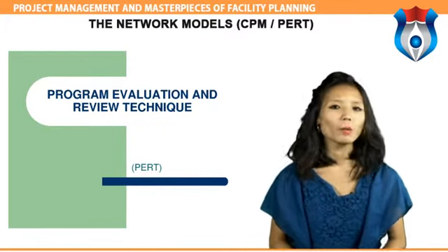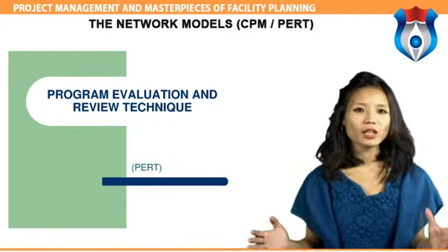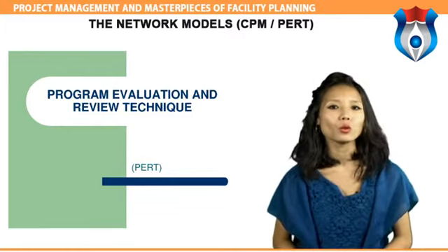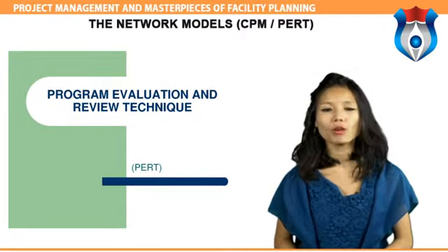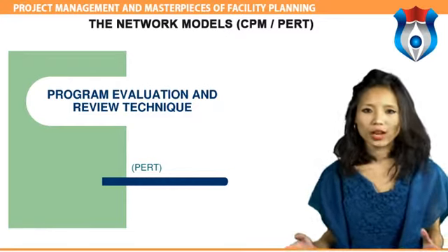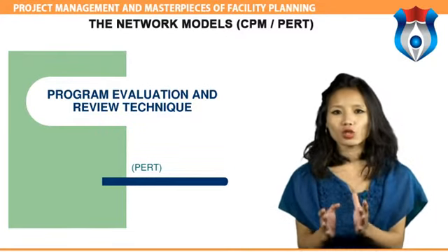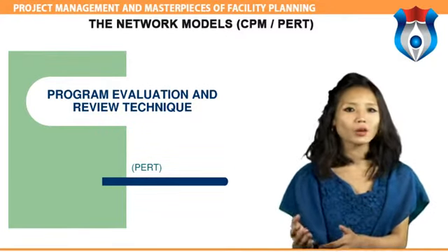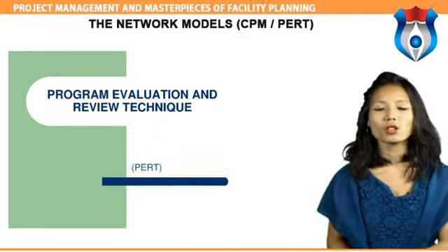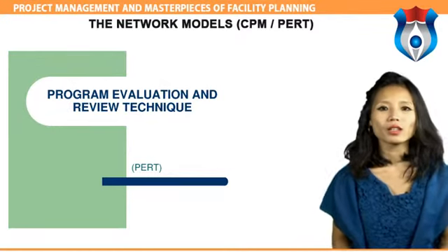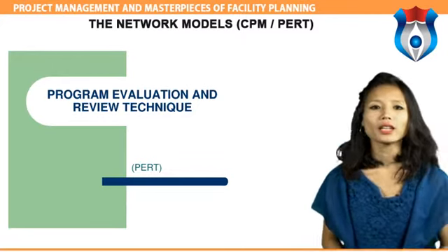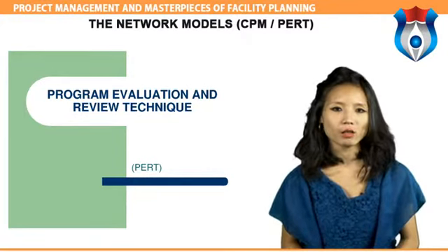So far we have talked about projects where there is high certainty about the outcomes of activities. In other words, the cause-effect logic is well known. This is particularly the case in engineering projects. However, in research and development projects or in social projects, which are defined as process projects, where learning is an important outcome, the cause-effect relationship is not so well established. In such situations, the PERT approach is useful because it can accommodate the variation in event completion times based on an expert or an expert committee's estimates.